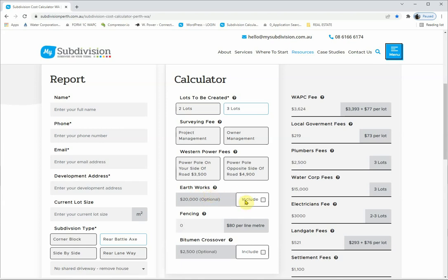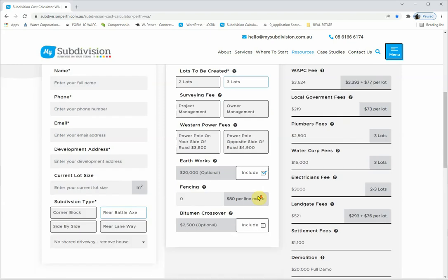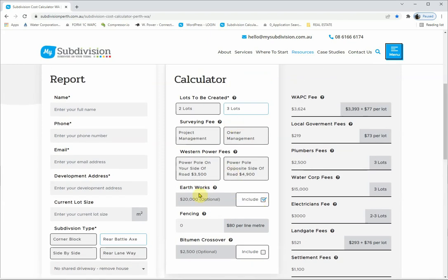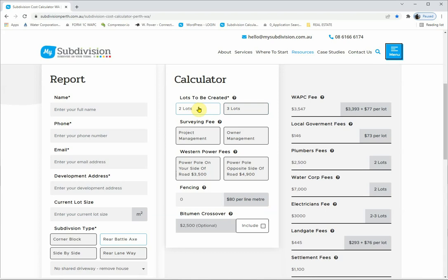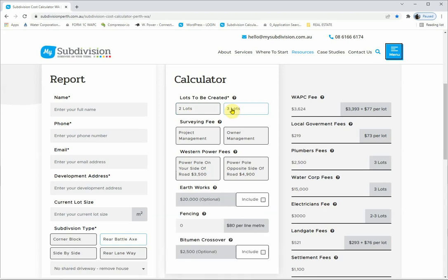For a three lot subdivision we've left earthworks as an optional checkbox, but we would prefer that you click on it. That's the only real unknown when going from two to three lots — you need to understand that earthworks may or may not be required. Let's stick with three lots to keep that option in the picture. Now, the surveying fee option: do you want surveying only, or project management? We are a land surveying company first and foremost — My Subdivision is part of Zenith Land Surveyors.